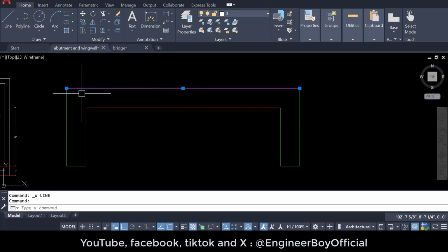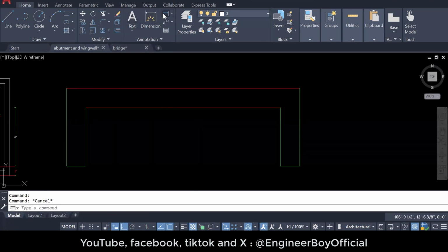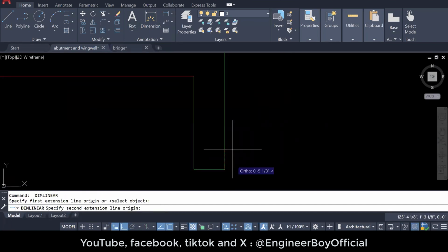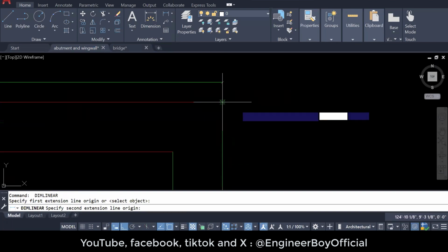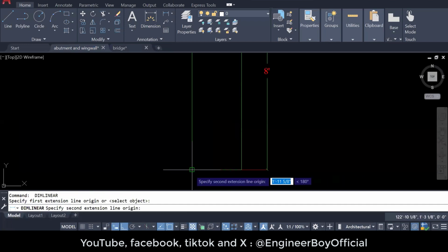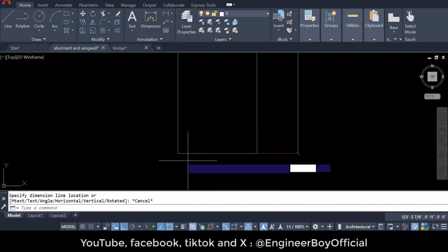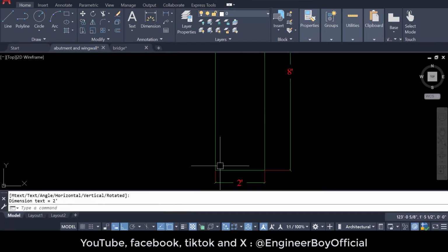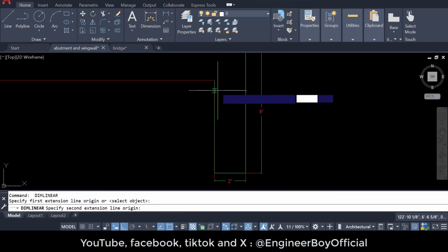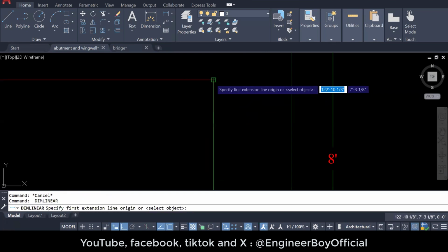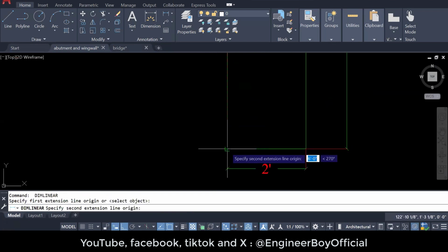It is actually 20 plus 2 plus 2 for that side, so that's going to be 24. Now this is 6 plus 2, which is 8. Now this portion is 2. As a quantity surveyor, you should be that familiar with drawings, so you can even work things out before counting the digits.